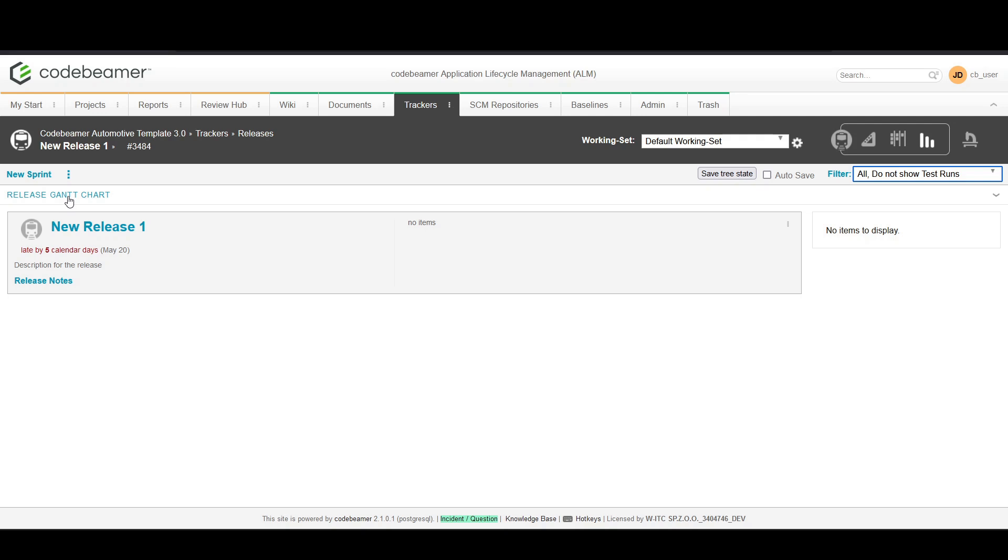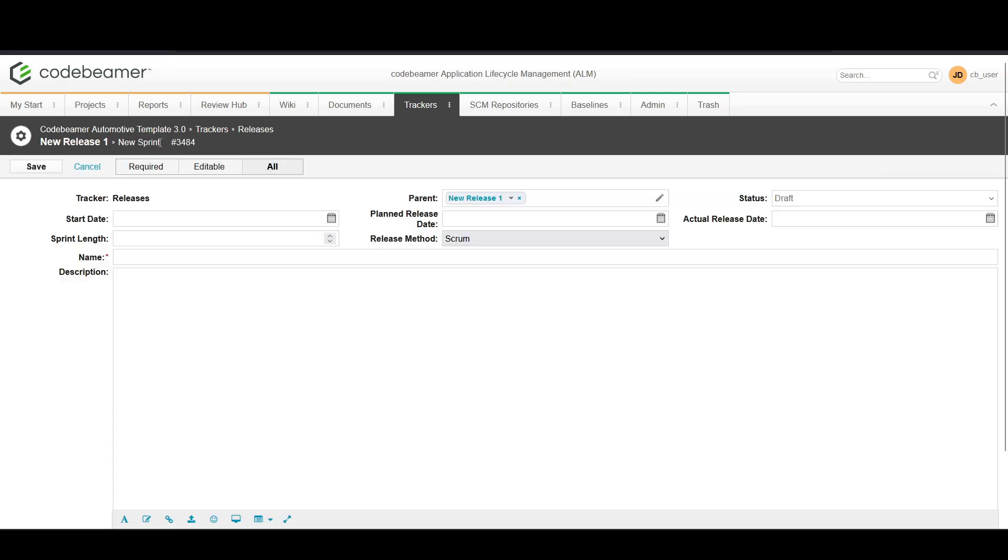Once inside the release, look for the option New Sprint. A form will appear where you enter the details of your sprint. Start with the name of the sprint and provide the description. Next, set the start date and end date for your sprint.